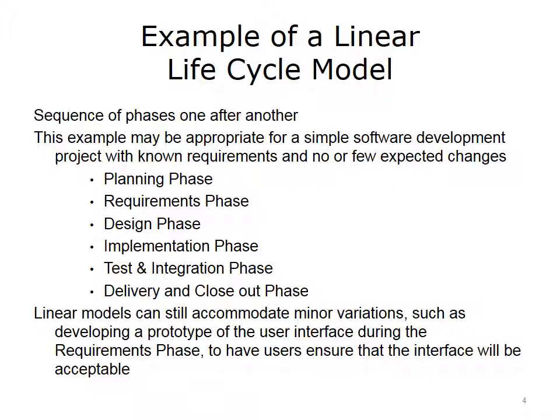We said earlier that the end of a phase could be an opportunity for you to exert management influence and, for example, review the work that went on during that phase. That process is sometimes called a quality gate or an exit gate. It requires you to demonstrate that the phase really satisfied all the objectives of, for example, the planning phase, before you move on to the requirements phase. So the linear flow of this life cycle might be a bit misleading. There's still room for feedback and control and exercising your management judgment to make sure the team is prepared to move from phase to phase.